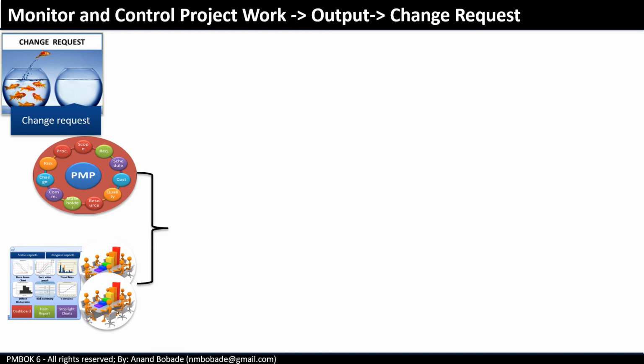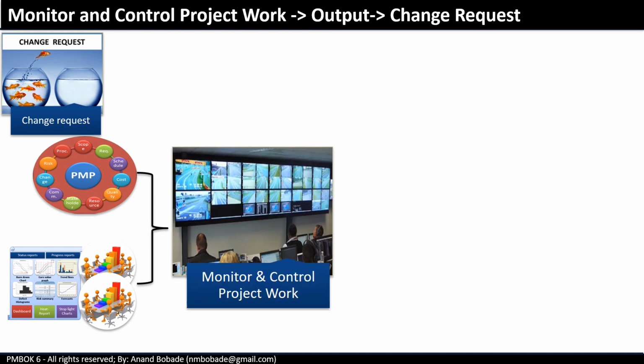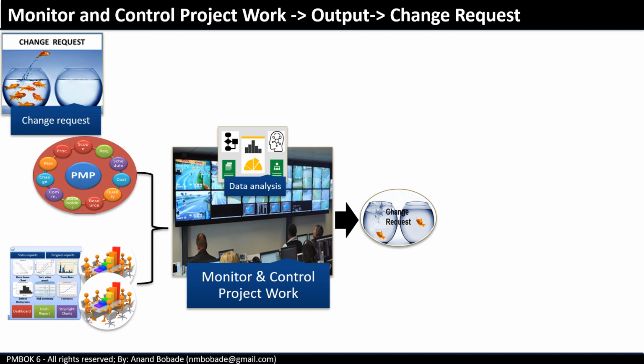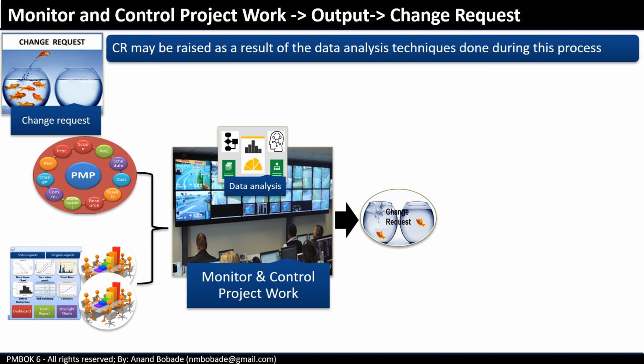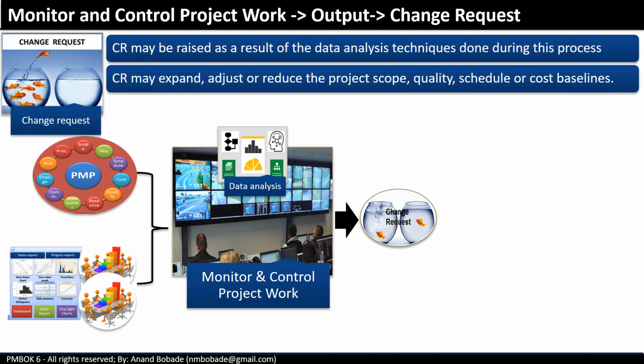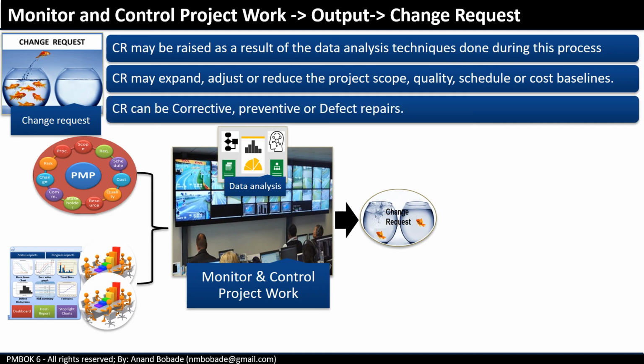Change request. Think for a moment, if you are performing data analysis that will result in determining corrective or preventive actions, how are you going to execute them? Of course, by raising a change request. A change request may expand, adjust, or reduce the project scope. It might impact quality, schedule, or cost baselines. Change requests can be corrective, preventive, or defect repair.